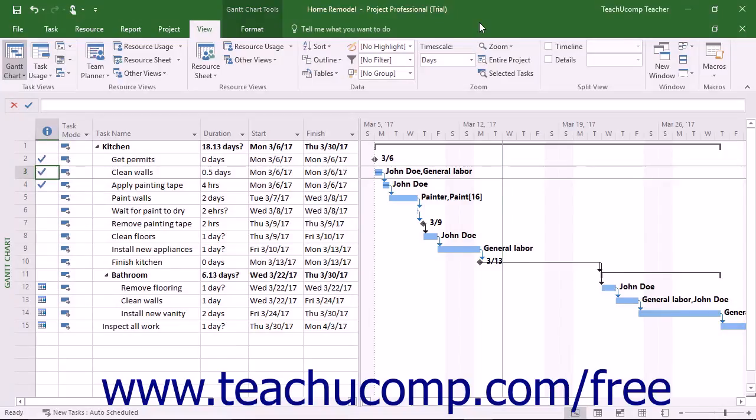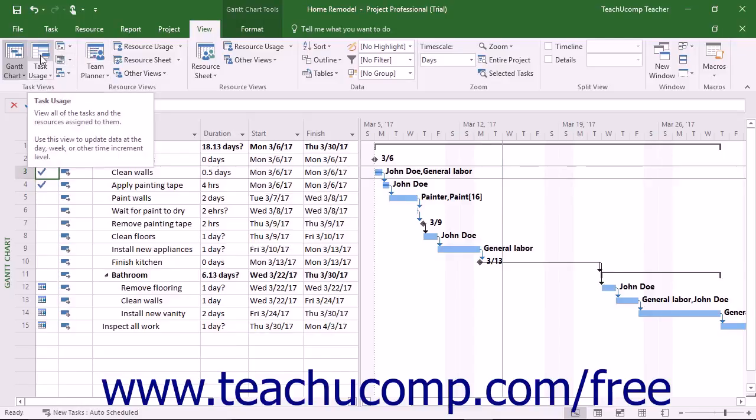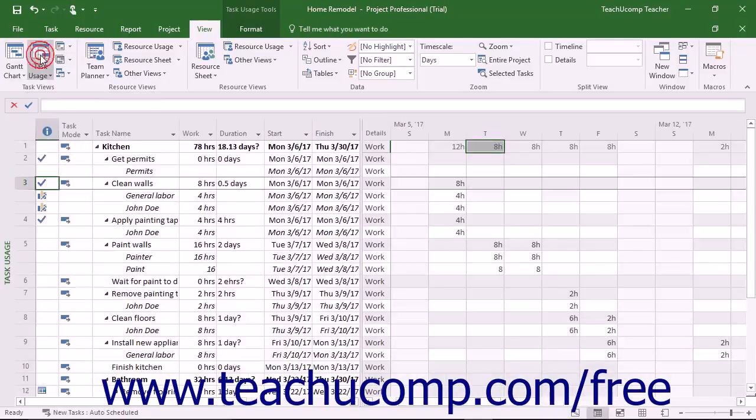The Task Usage view shows the hours spent by work resources on the tasks in a project file. To see the Task Usage view, click the Task Usage button in the Task Views button group on the View tab in the ribbon.